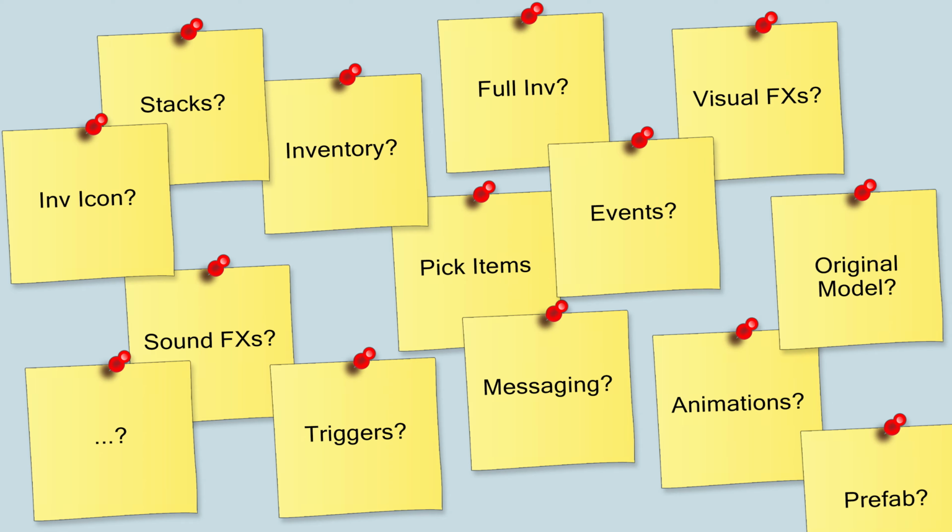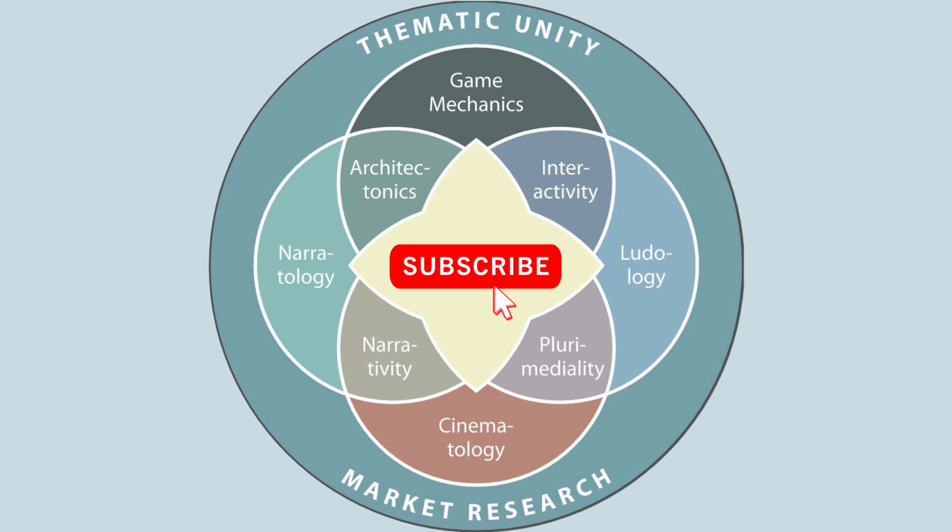Plan everything. Don't just look at the code you need to write. That's not building a game. Building a game involves a lot more. You will need models, sprites, audio, special effects. You will need lighting, a lot of time promoting your game or recording videos, building a Steam page, creating websites.